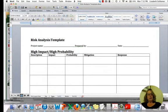And what you do on this, so initially when you start to do this template, you start with the name of the project, who did it, the date. You always have this sort of identifying information so that if you have multiple projects you're running or you're doing it at multiple different times, you have some record. So this is the description of the particular risk that you want to do. And you might have some indication of impact and probability. It might just be high, but you might assign numbers to that, however it is that you'd like to do that.